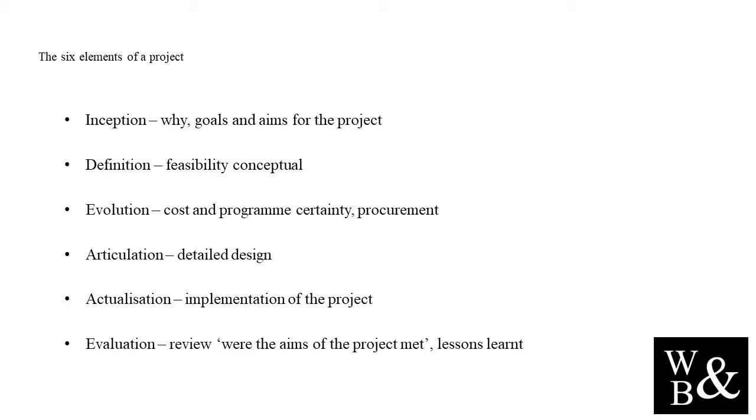In this element of the project, you need to start to develop a clearer picture of the likely whole project budget for each of the options and allow appropriate contingency budgets by assessing the risk to the project. You and the project team will also need to identify where the project funding will come from. Will it come from capital expenditure or operational expenditure? Will the project generate income once implemented?